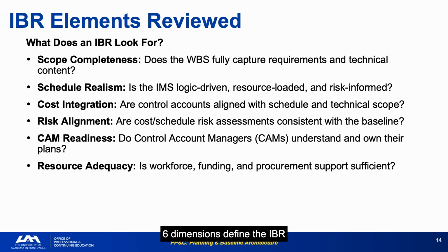6 dimensions define the IBR evaluation framework: scope completeness, schedule realism, cost integration, risk alignment, CAM readiness, and resource adequacy. CAM readiness. Do control account managers understand and own their plans? This is often the most revealing dimension. CAMs who cannot explain their plans, do not know their assumptions, or defer every question to the PP&C team are not ready to execute.